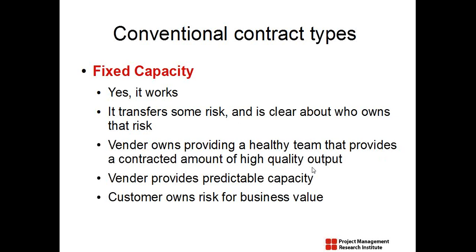There the partnership ends. So if an American company comes to India and they want to run an offshore development center within a company in India, then I'll provide them with the space, I'll provide them with the team members. Project manager could be from their side or from my side. There my responsibility ends. So I'm not accountable for the milestones. So that is an issue.